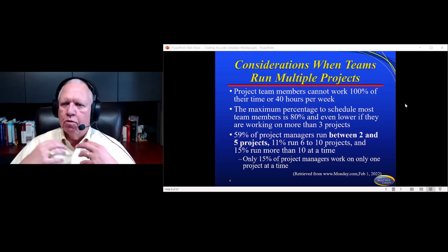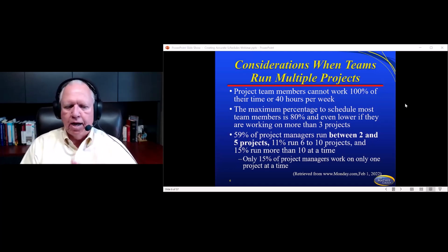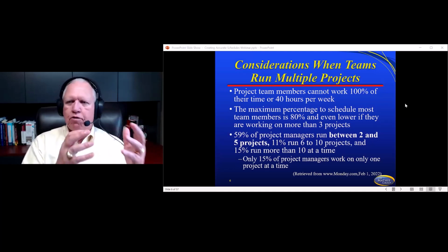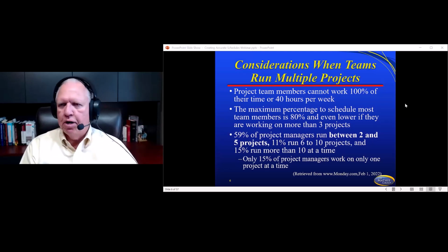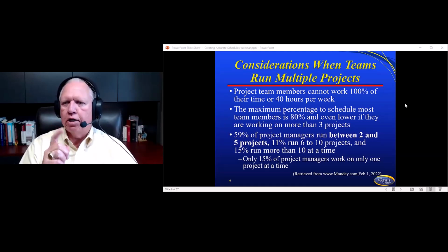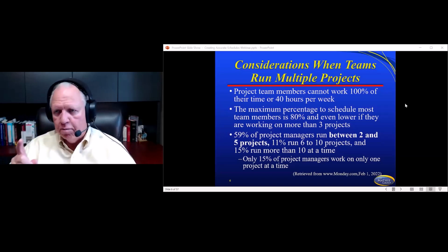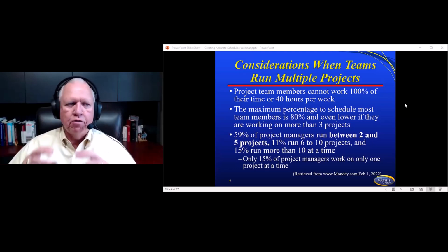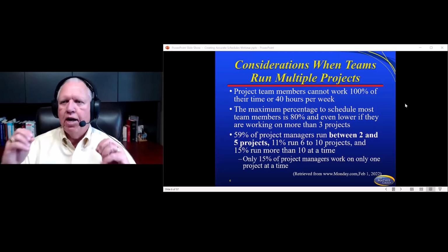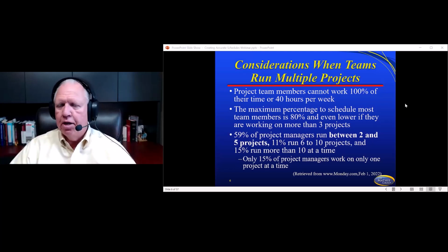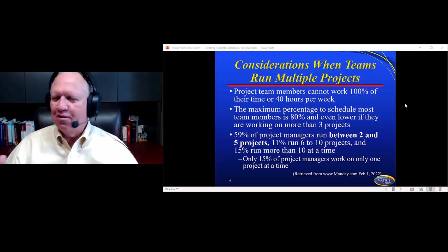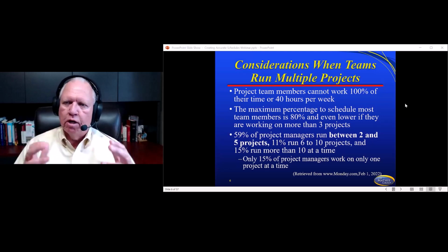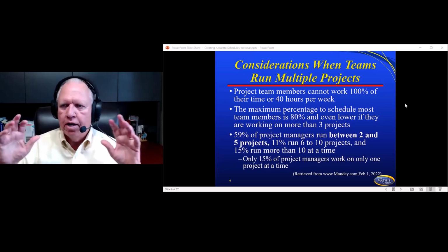And that's one piece that we're biting ourselves. We're trying to create a schedule a lot of times, and we're optimistic on every schedule. So in other words, project 1, we're optimistic. We can do this in 50 months. Well, you probably could if that was the only project. This project, we could do this in 24 months. You probably could. But can I do those 2 projects in 24 and 50 months if I'm using the same resources for the most part and anticipating crisis? Probably not. And so you're not trying to be the doomsday prophet, okay? The sky's not always falling, even though it's going to fall some. The sky's not always falling. But you are trying to be realistic that I've got the same group of resources in these 2 areas.